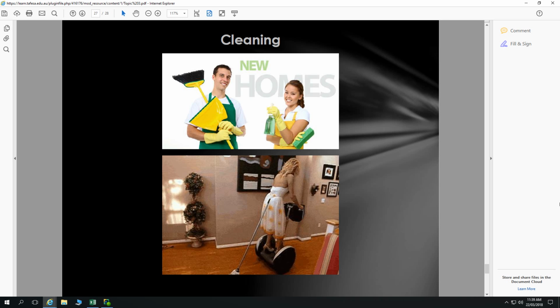The way around that is that within your contracts, you have standard inclusions for progress payments. So your first progress payment is on slab pour, then it's on framing, then it's on wall and roofing, then it's for lock-up, and then handover. So you've got those 5 progress payments happening throughout the process. That involves a valuer from the bank coming out, inspecting, okay, yes, everything's been done to a satisfactory standard, we can pay the builder that portion. That should also be included in your scheduling as well. It's an important part of your financial scheduling to know when those progress payments are going to come through and budget around that.